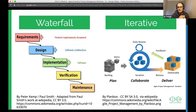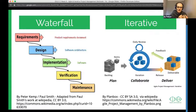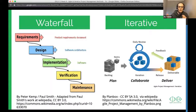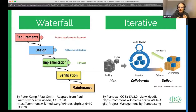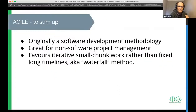Agile pushes back against that, saying we need to be interacting with people all the time, doing things in small chunks, and working iteratively. You have a backlog of items to be done and take off a small discrete chunk at any given time — maybe a day, a week, or a month's worth of tasks. Once done, you release it. At any given time, what you're releasing is a complete project with just a little bit more added each time. You get feedback from your community or peers, pull that back, and add more items to your backlog — a much more circular cycle with shorter, smaller releases.